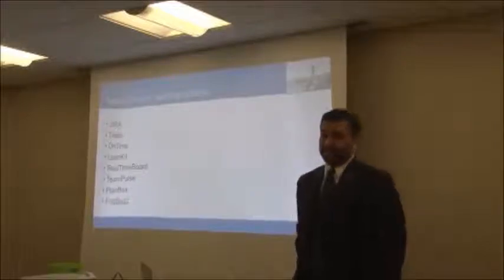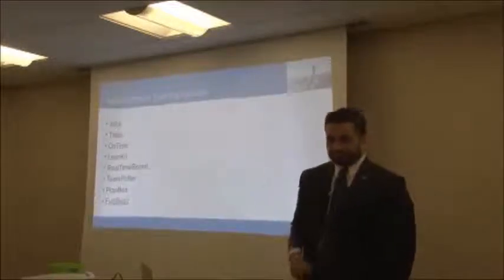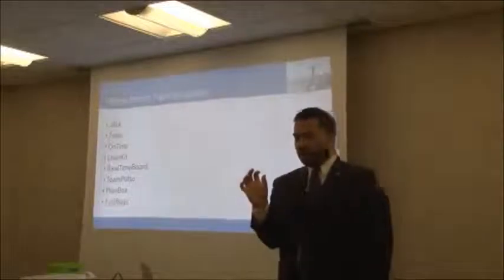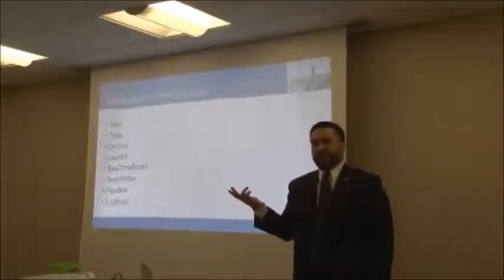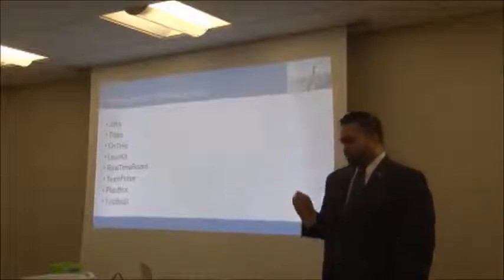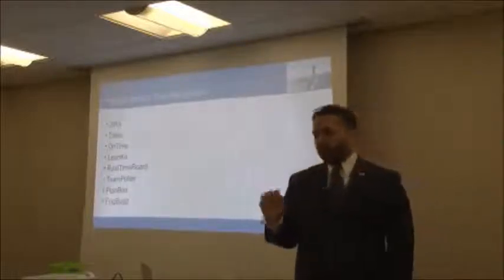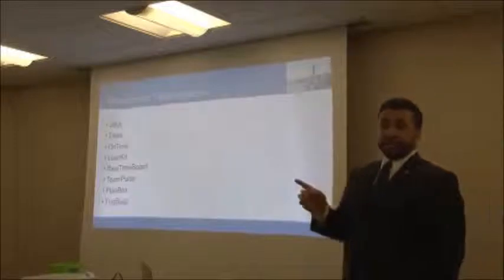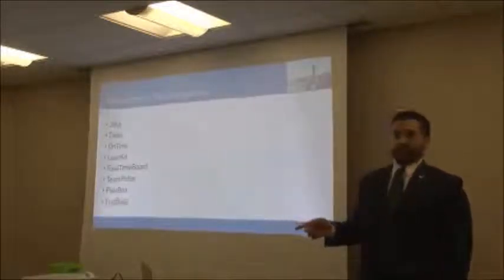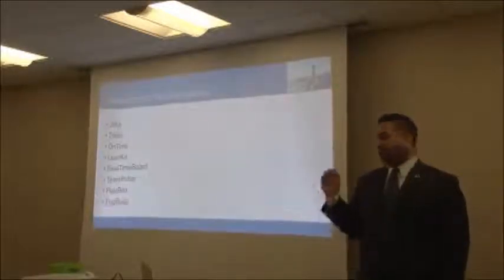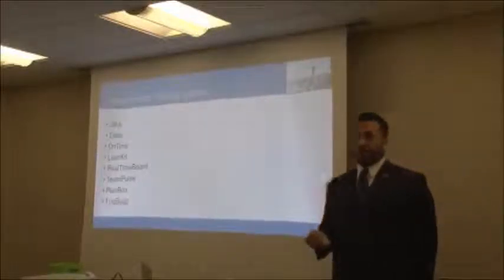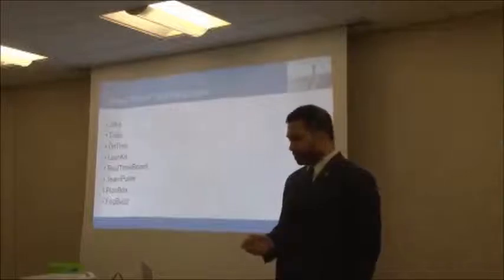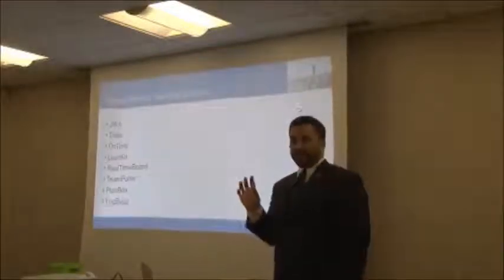Certainly, at least at the end of the sprint, if we're talking Scrum. If you're not doing Scrum, then at some relatively short period, but not too short. What does that mean? It depends on how you're doing it in Kanban. But if we're talking Scrum, just to keep it easy for the moment. At the end of the sprint, you'll probably talk about some of this at your demo, or at your review, sorry. And then if there are problems, you'll probably air them out at the retrospective. So at the very least, that often.